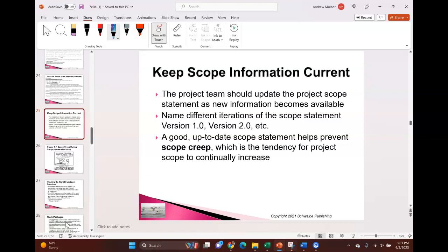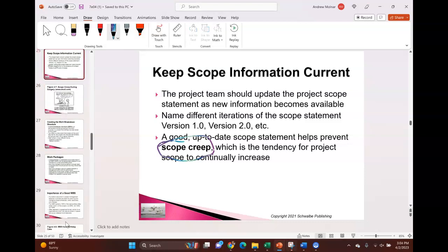Now, what we're trying to avoid is the term called scope creep. That's where scope gets added along the way, but it's not really part of the project. So say my project is to deliver a really pretty picture frame of a couple, and that was my only requirement. And I didn't ask the sponsor or other stakeholders for clarification. That's a role as a project manager, clarify the scope if I have questions. So what I do is I go out and I build this really ornate frame, or I go to Michael's store and I have a really ornate frame and I have it triple matted and put under glass. None of that was part of the requirements. That's scope creep, where I've added things that really weren't justified or required in the project.